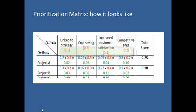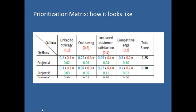So the link to strategy criterion has a 0.1 weight, while cost saving has 0.3. In other words, cost saving is three times as important as link to strategy criterion. By this we have our criteria weighted according to importance. Similarly, we rate each project against each criterion. For example, project B would have three times the effect on customer satisfaction as that of project A.